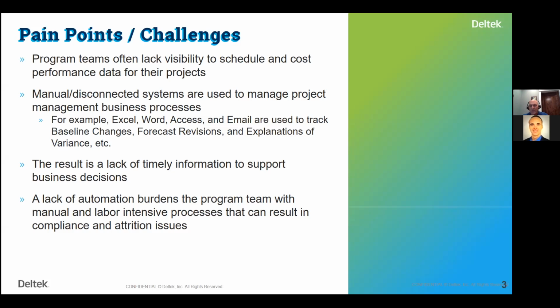Another big challenge is that a lot of organizations, even if they have a good scheduling and cost solution, end up having a lot of manual and disparate systems in order to drive a lot of the earned value processes. Things like collecting status might be done on a copy of the schedule and then provided to a scheduler to enter in. Or the ETC may be put into an Excel spreadsheet and then fed back to a CAM or to the project analyst to enter in. So a lot of disconnections there that cause a lot of manual effort.